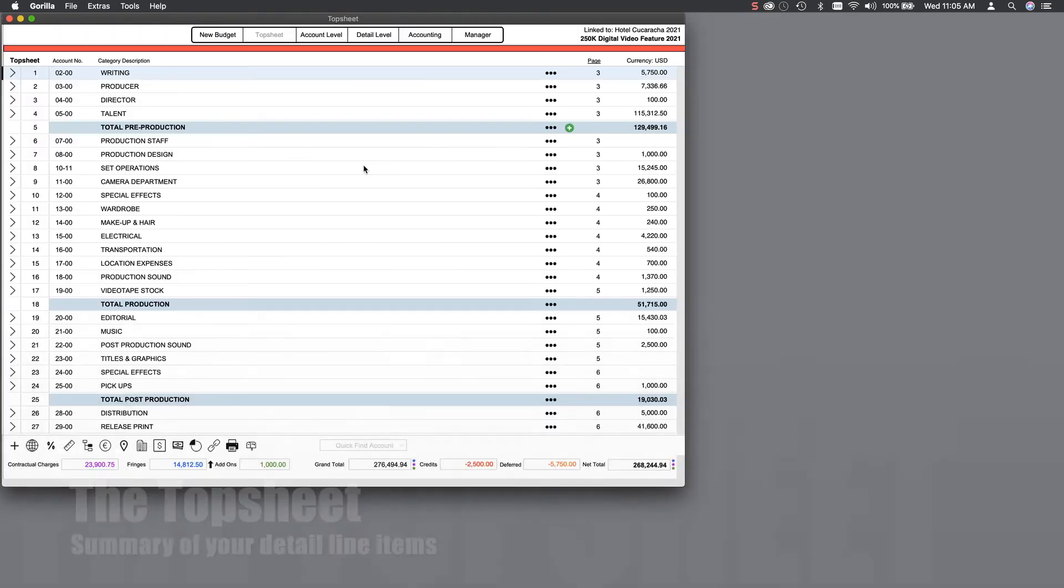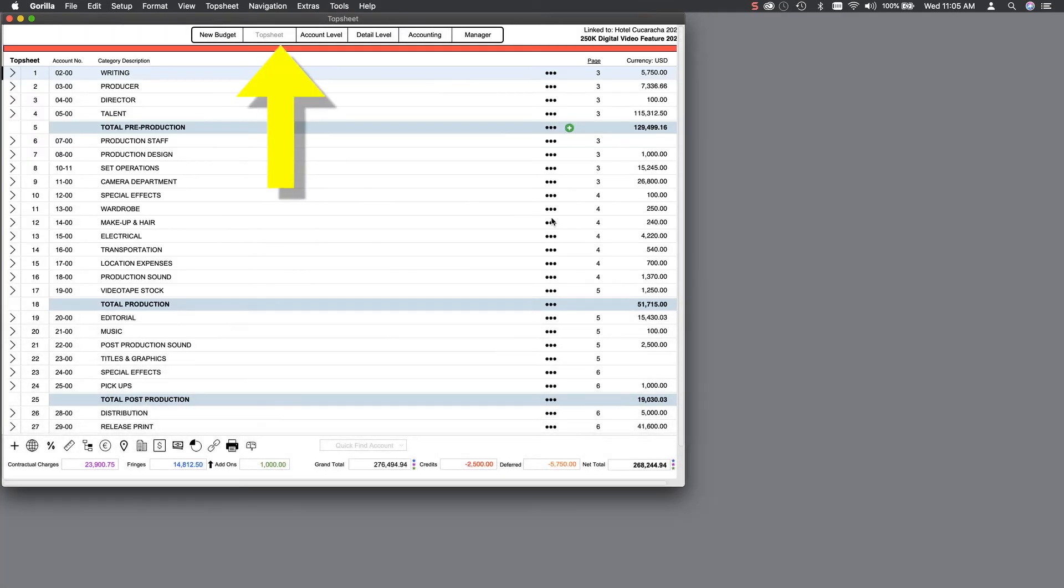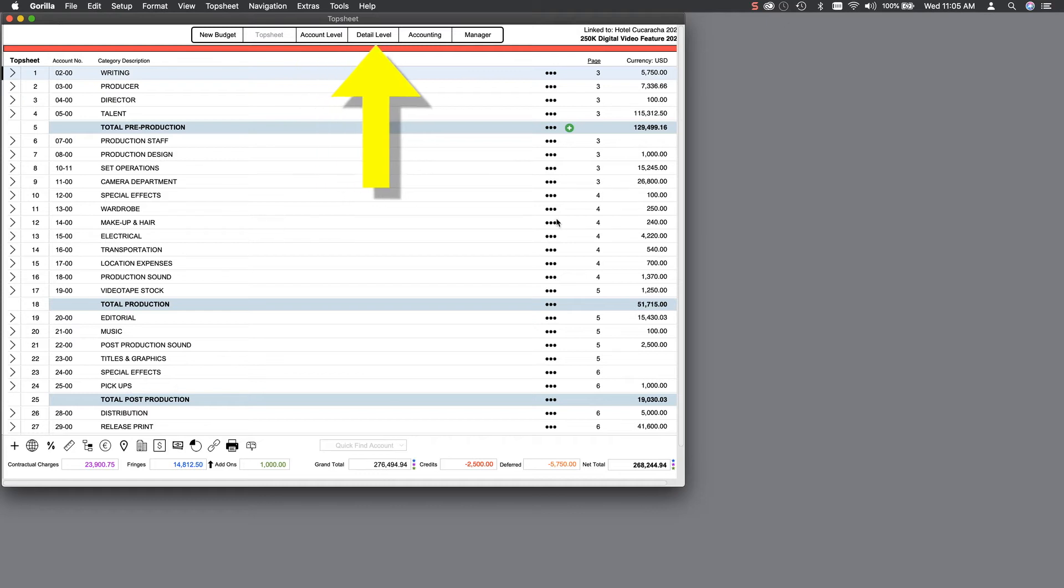Budgets are divided into three sections: the top sheet or the summary sheet, the account level, and finally, the detail level or sometimes referred to as expenses.